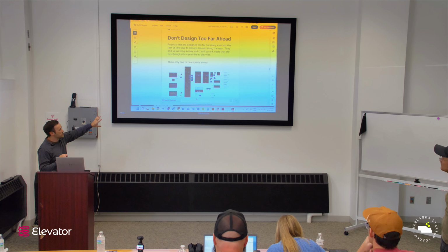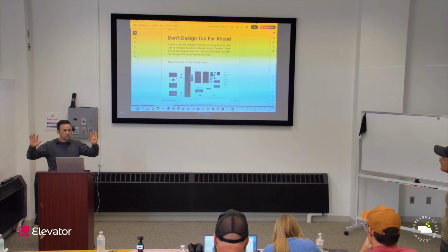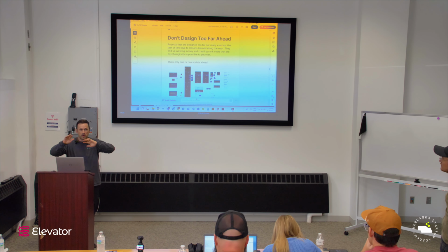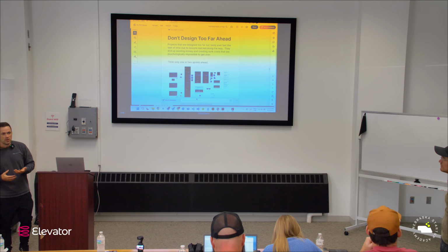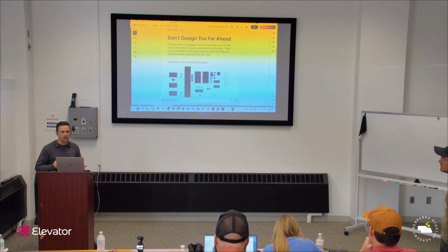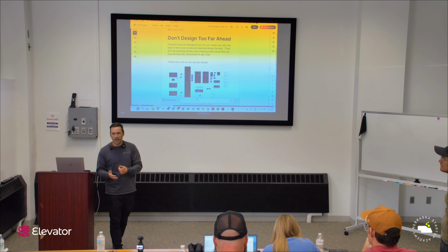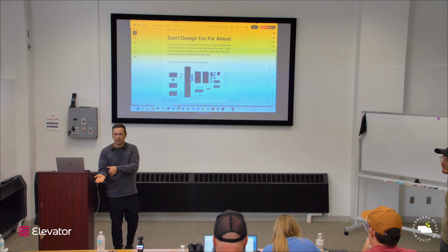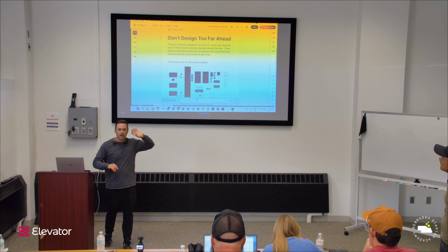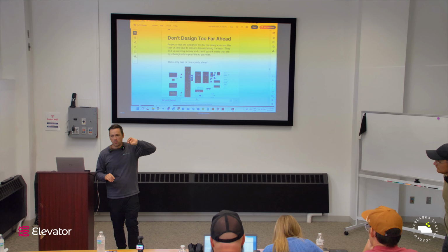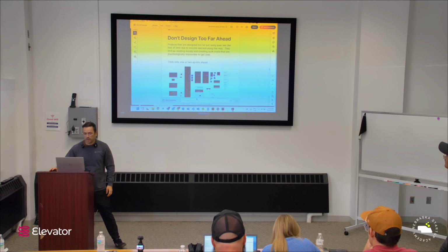A lot of times customers will send us these huge mock-up boards, and they've got months and months planned out of their actual software app. I know where every button's going to be, where every interaction is going to be, and then like I said, we get to week one of actually building this out. They test it, and they realize one of their hypotheses was incorrect, and they have to completely pivot to something different. And all that work they did just gets thrown away. So really, you'll hear the word agile development, but really, start small, figure out that first early feature, and then expand from that feature.